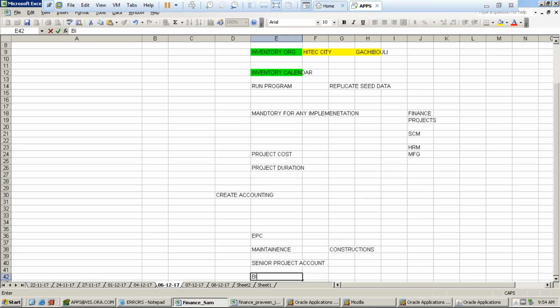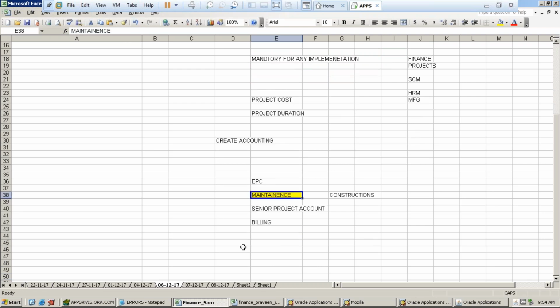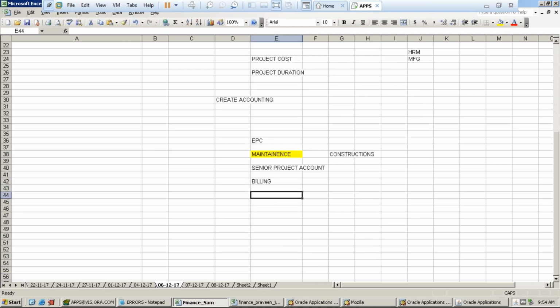Okay. So the maintenance services is basically considering, for each project, what are the expenses and what are the revenues on a monthly basis, and updating the forecast and updating the budget, doing the variance analysis. And most of the costs that kick in are of the time nature of both equipment as well as labor, billable, non-billable, so on.